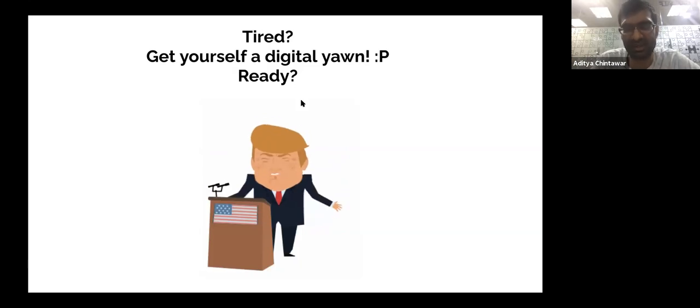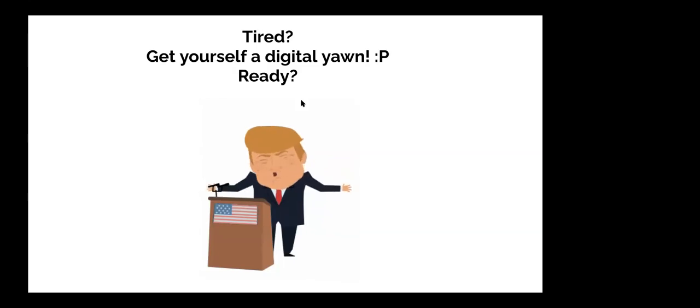Now, once you present that to the tech teams and share it with them, they would always have a rough understanding of how you have done this. And if you have given 10 items and they come back and say that we can only do 6 items, that means your estimation and your understanding of the architecture and the tech way of doing something is not aligned. So that is how you get an indirect validation. If you have more questions, you can directly validate, but you more or less understand quarter on quarter what their capacity to deliver is. Okay, got it.